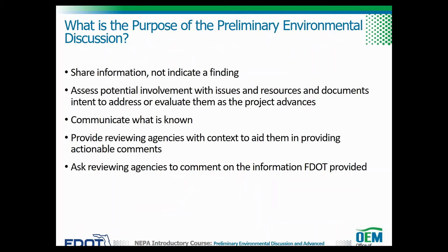The purpose of the PED is to share information and communicate the project details with the public and commenting agencies. Because a PED is a preliminary environmental discussion, findings are not included. The PED discusses the potential involvement with issues or resources and documents FDOT's intent to address or evaluate effects as the project advances.